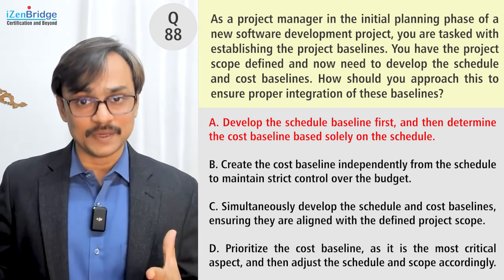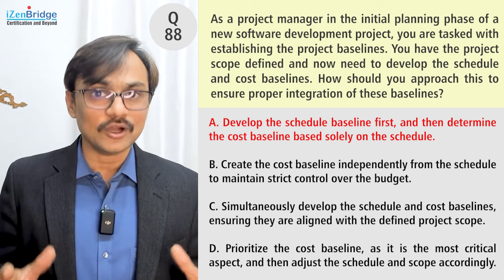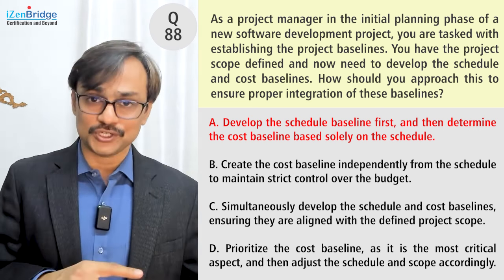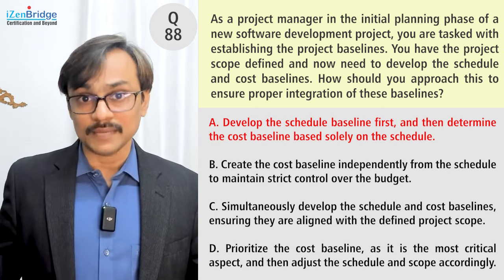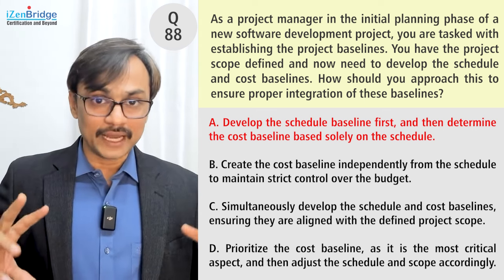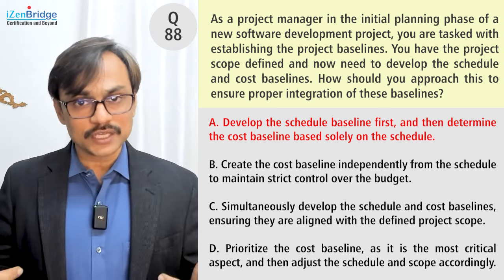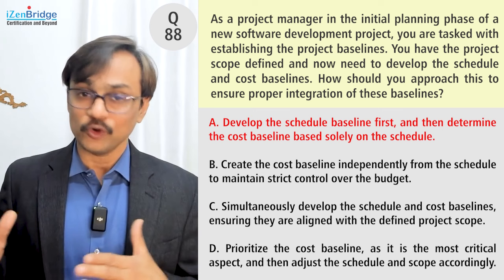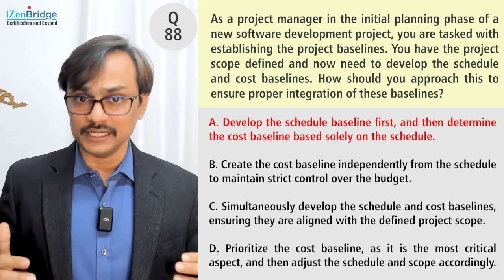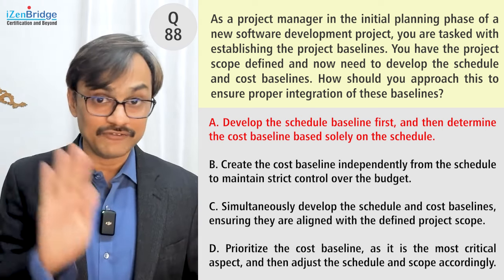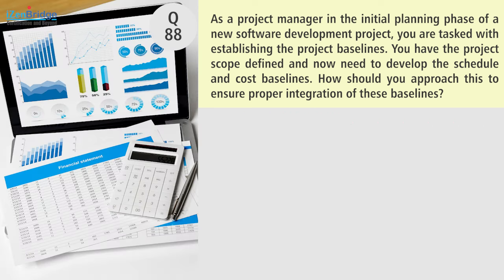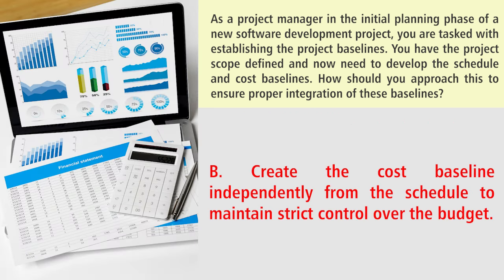Sometimes we learn project management that way in classes, but it's not a great idea. When you are working on cost, you may end up changing your schedule. Sometimes you want to do things faster, you may do crashing during scheduling, but when you estimate the cost of that crashing, you may want to reconsider. So Option A is not a good idea — I can't freeze the schedule before looking at cost.